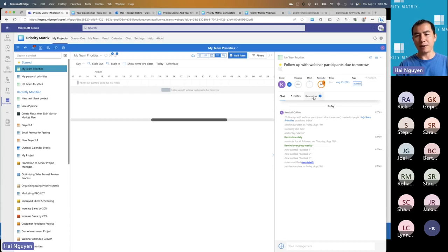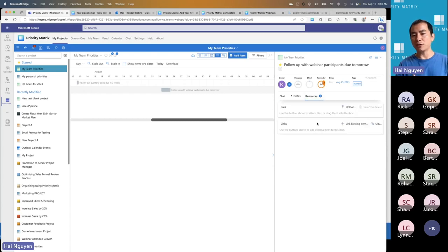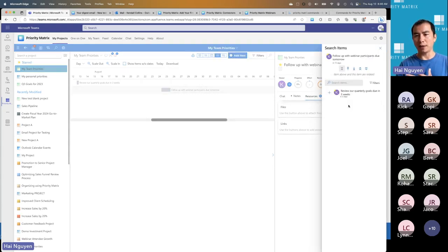And if you go to Protomatrix resource section, you can actually link to items. For example, I can link items together, and then I can add dependencies. I can say these items are blocked by, or these items block. So item A blocks item B. To build a foundation, you've got to pour the concrete before you can actually build the walls, etc. So then task A blocks task B. So you can do all that.